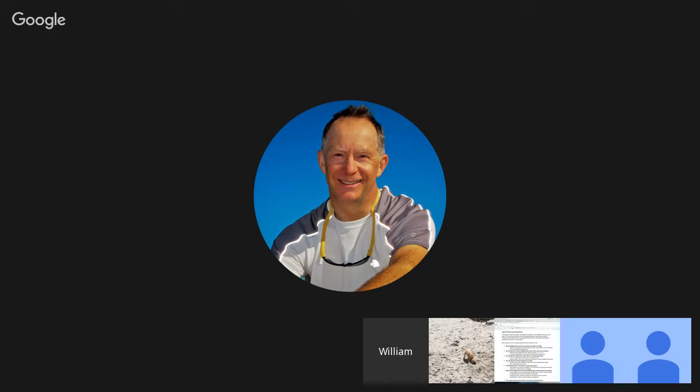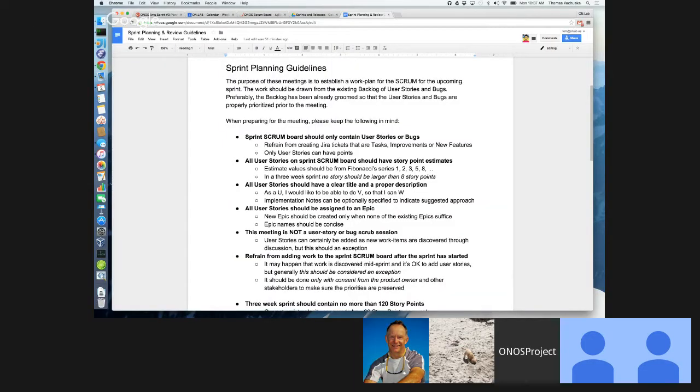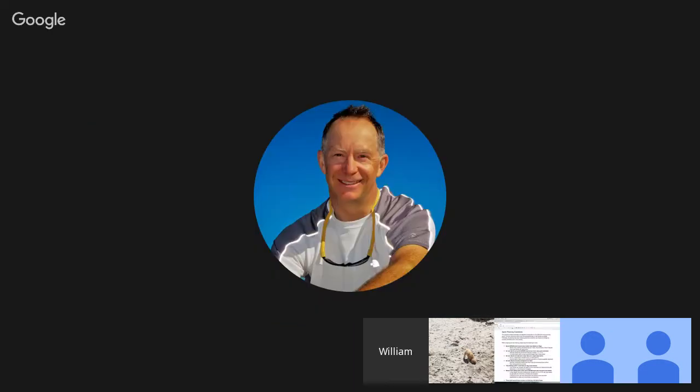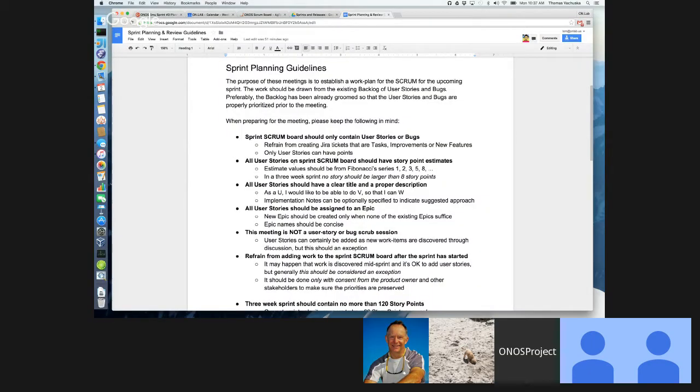We should also strive to make sure that the user stories have clear titles and proper descriptions, to be assigned to an epic so that we can keep track of them better. And generally, this should not be a user story or bug scrub session meeting. The backlog should already be groomed and populated. But of course, we can expect to do some polishing in here. Just generally should not be a scrub session.